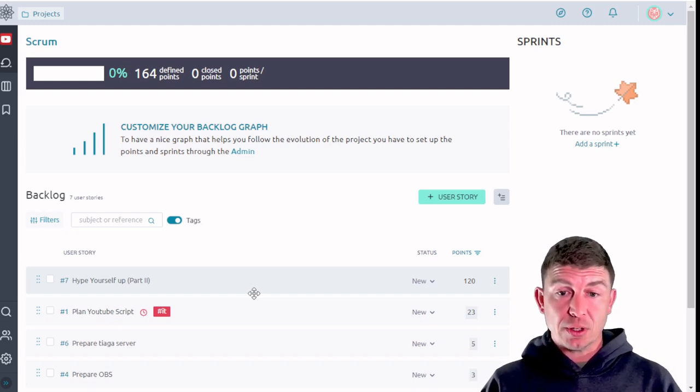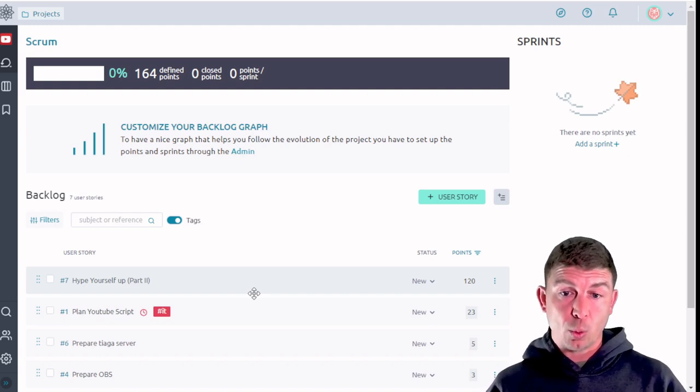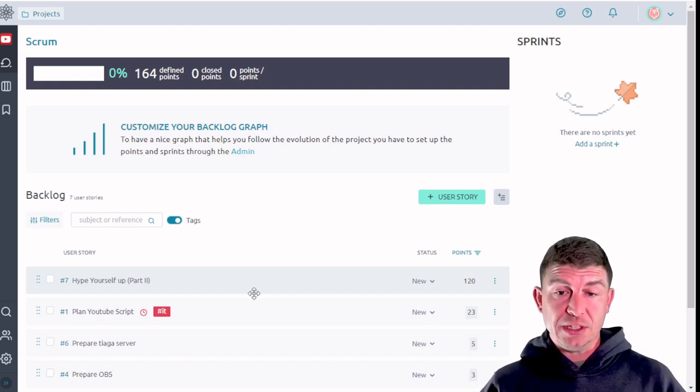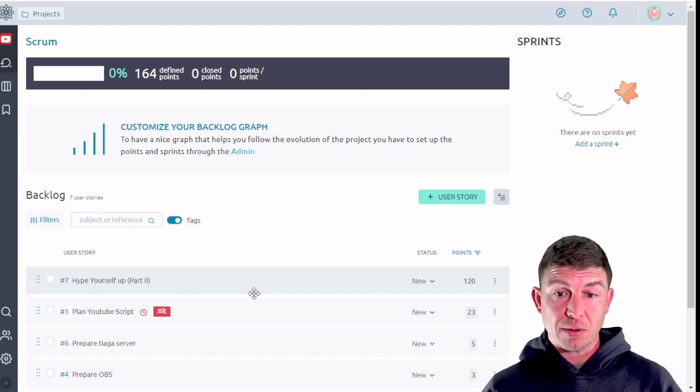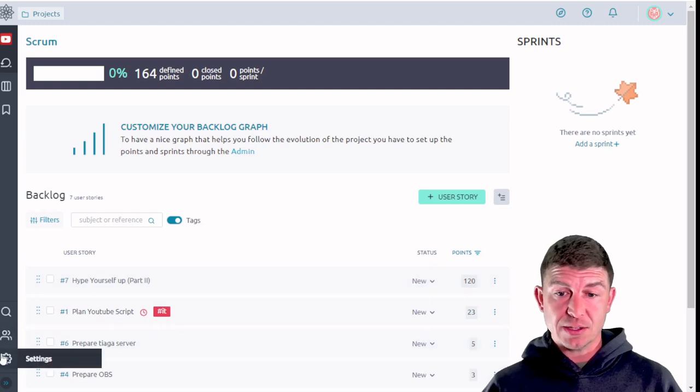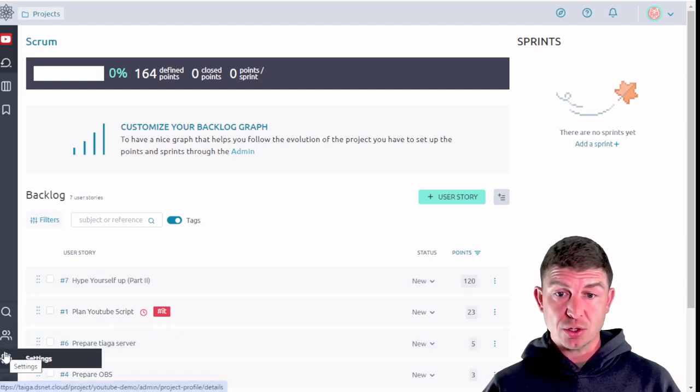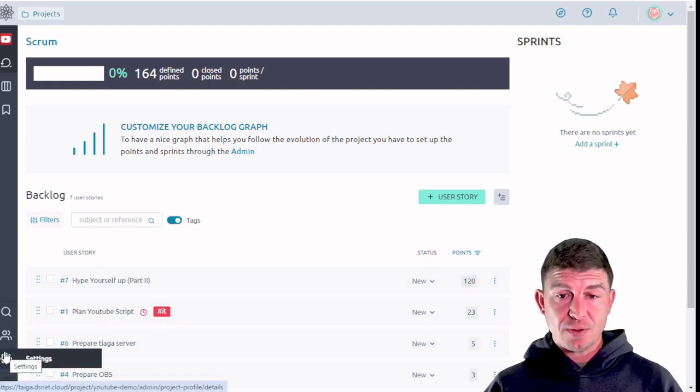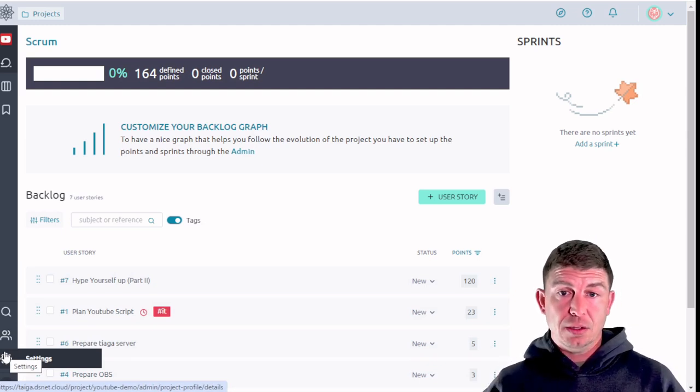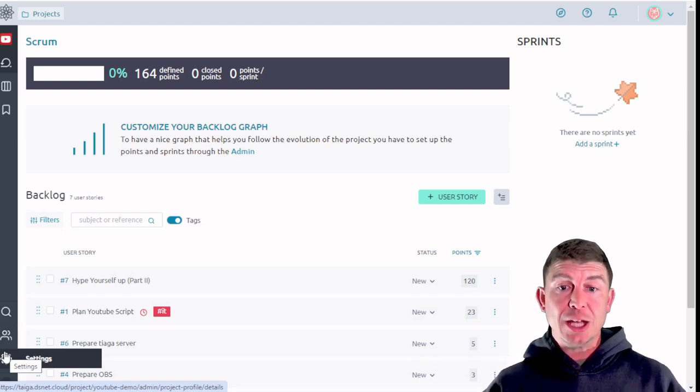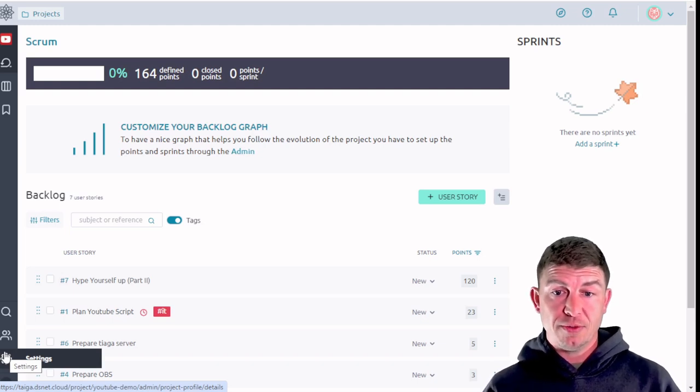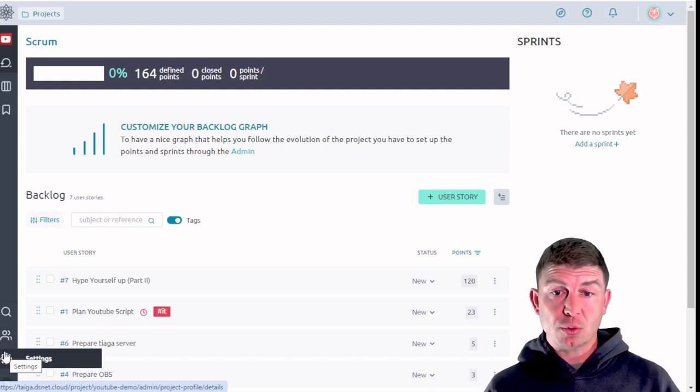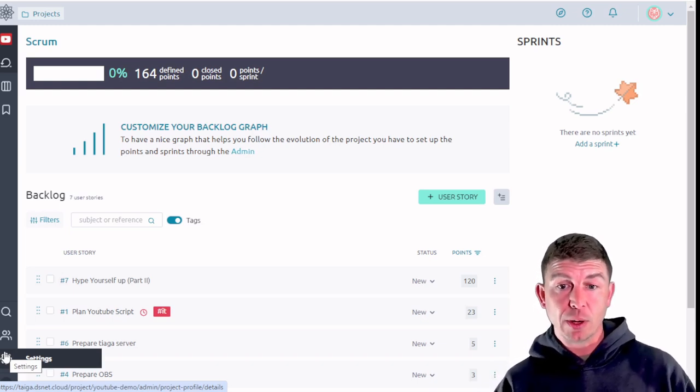So by default a sprint is one to four weeks. By default in Taiga it's a two-week period and you can modify that down in the settings section if you wish. By default it's two weeks that is where scrum came from. It was created to provide an iterative approach to fix problems or add features in a software environment.